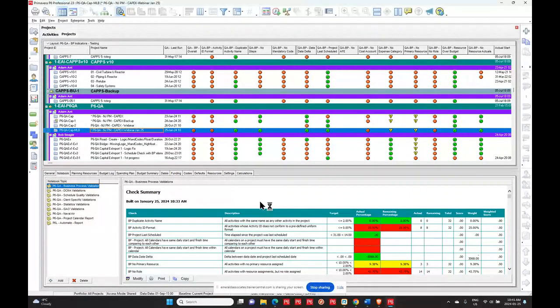Now, P6-QA will also check for mandatory codes. That, in my world, is a very big one, because many times we've helped clients with, okay, this report is not pulling out the numbers that we expect out of P6. And you go in and you find out you've gotten an update or something from a subcontractor, or somebody's done something in the schedule, and the code or set of codes that pulls the information off that activity to the report they're looking at isn't there. So those numbers didn't go. So you will have a bit of a problem with that.